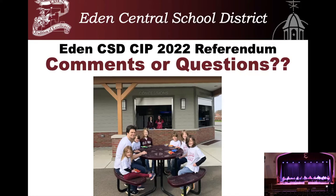Do you sense that this one's longer, or are we still in that sort of time? No, they've actually decreased the review time, which is a good thing. I think last time I checked on their website it was about 6 to 10 weeks. It was a lot longer about a year ago, but they have improved on that review time, which is great. When we put the last project in, I think the estimated review time was like 35 weeks. So they've come down quite a bit since then.